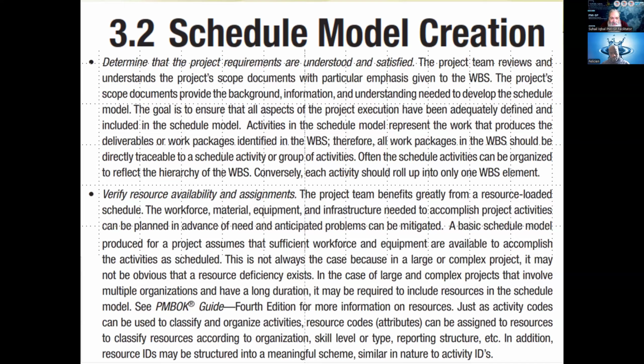Just as activity codes can be used to classify and organize activities. Remember, we said that the numbering system we were using to identify the work packages and the activities is really very important because that can be used to refer to that specific activity, especially by the accounting people who are allocating funds for you. They would not be interested in the names of the activities, rather their code numbers.